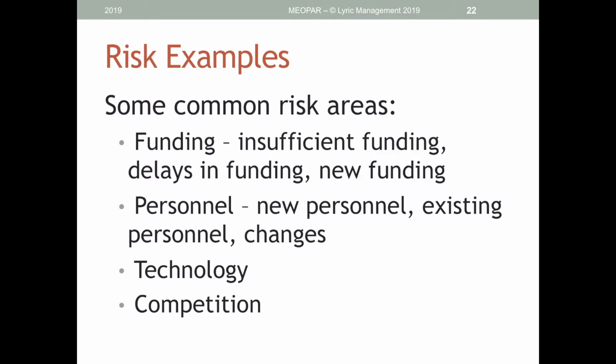In this day and age, very frequently when we receive grant funding or other funding for research projects, there are shortfalls in terms of the total dollar amounts that are awarded. Sometimes there's an impact because of the delays of funding. We may write a grant application and a budget in 2019, but not actually receive approval to proceed with that work until early 2021, by which point a lot of the costs that we had anticipated will have changed. And that can have an impact on our ability to be successful because the funds that were awarded don't go as far as we need them to. So those would be examples of threats or challenges to the success of a project.